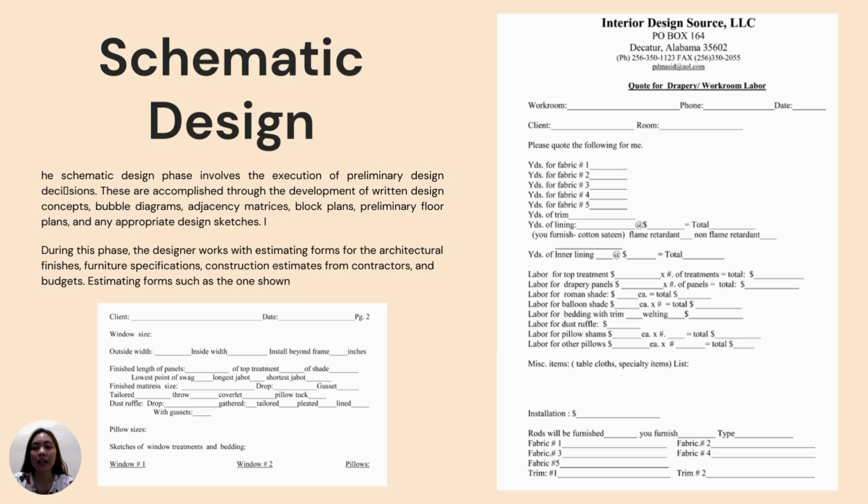After the review and client's approval of preliminary graphic documents, the designer can move to the next phase of the project. Obtaining client sign-off is a best practice policy to help the designer to be properly paid for design work, especially if the client makes changes after the approval.